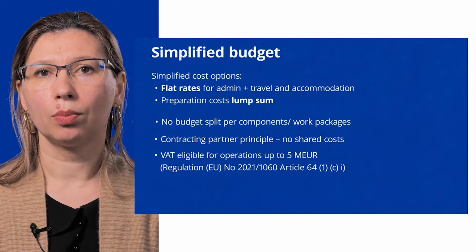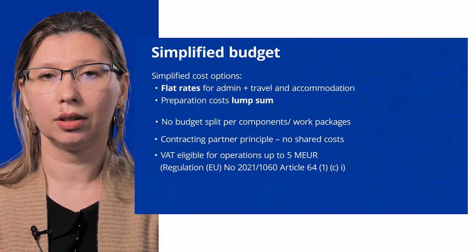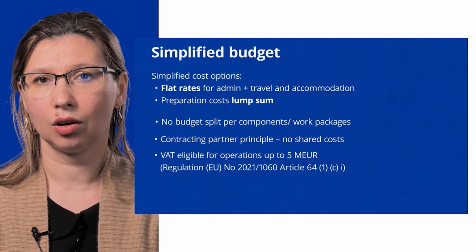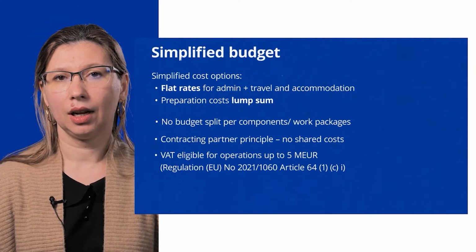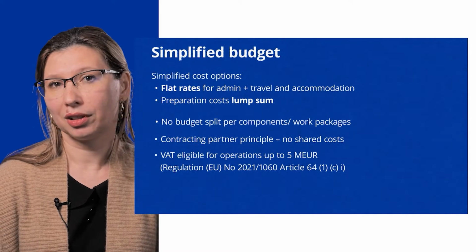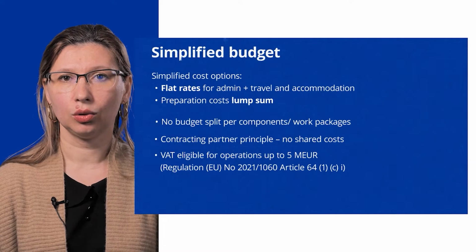A new feature of our program that stems from the new regulation is that VAT is eligible irrespective of whether or not it is deductible for the partner organization. Even if a lot has changed for the better or for the simpler, we still have costs that we will not accept and you should not include in your budget.